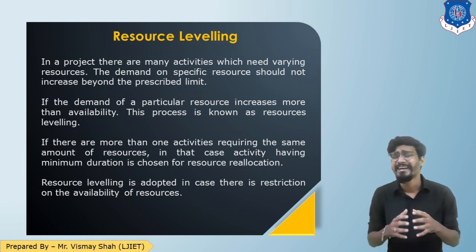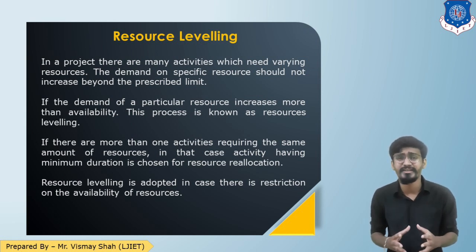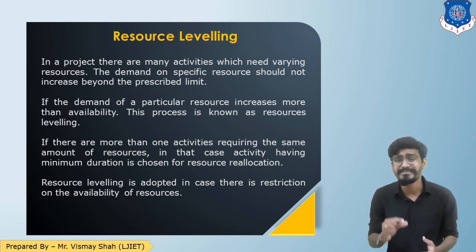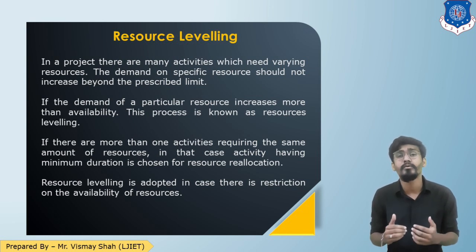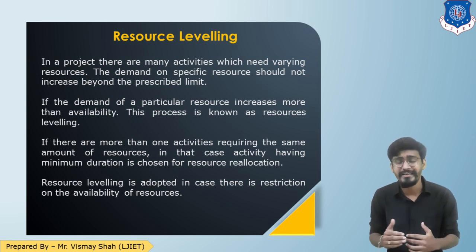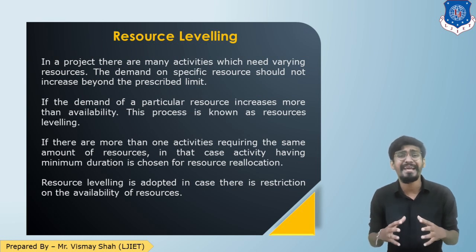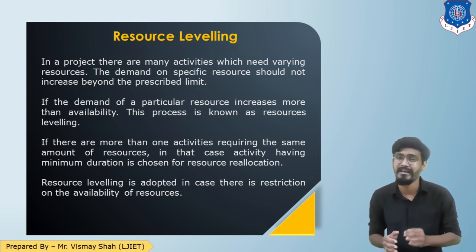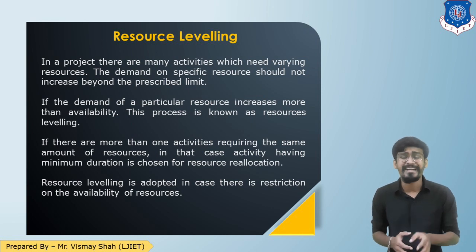In a project there are a number of occasions when, to complete the activities, we require a large number of resources. But in a real-time situation it may happen that a resource has a particular limit. In such a situation we need to delay the non-critical activity by its maximum float so that we can manage the demand and the availability of the resources.